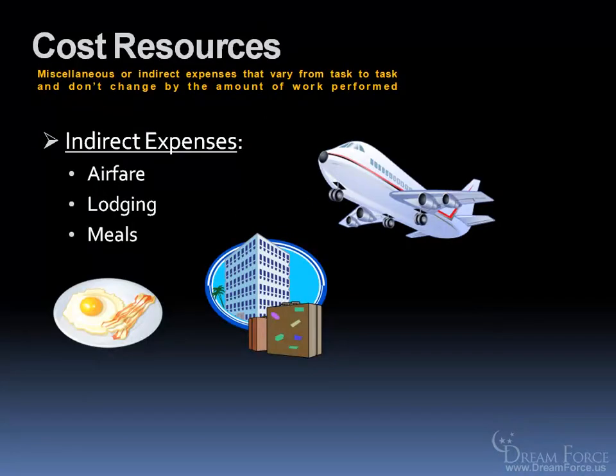The third type of resource are your cost resources. They're basically miscellaneous or indirect expenses that will vary from task to task, and don't change by the amount of work performed. And they include airfare, lodging, meals, things that don't really have a direct impact. But you still want to keep track of the expenses, because they're part of the project.